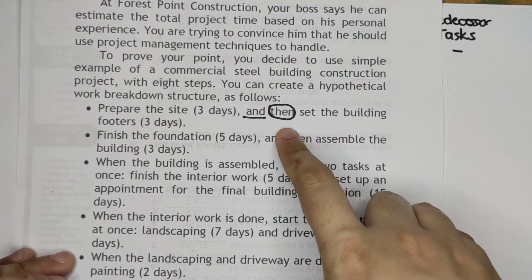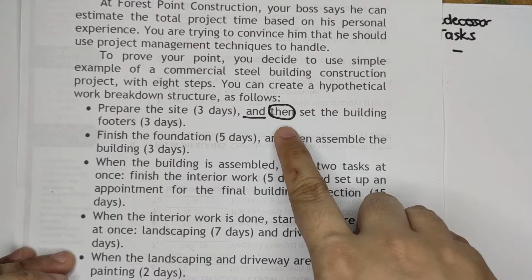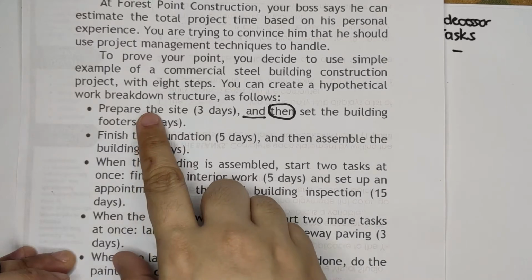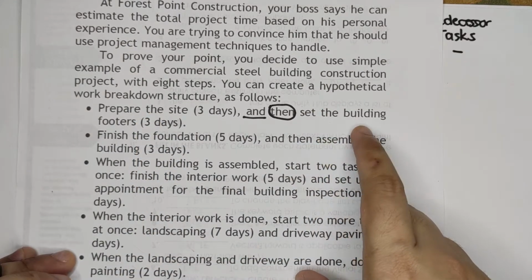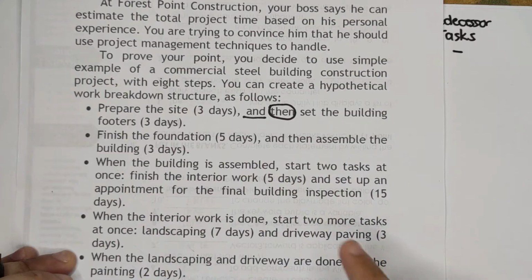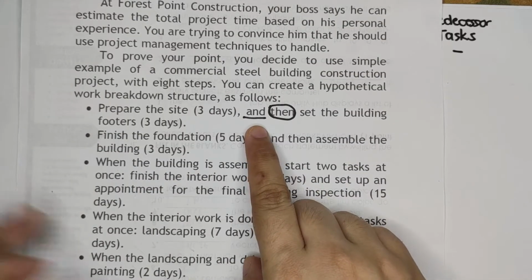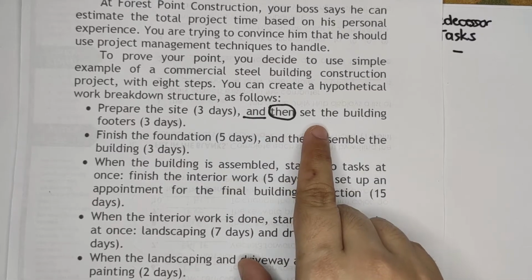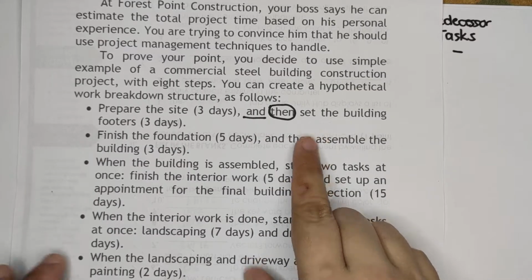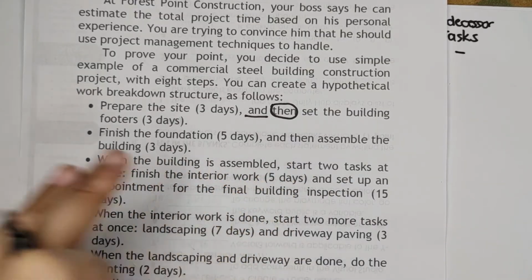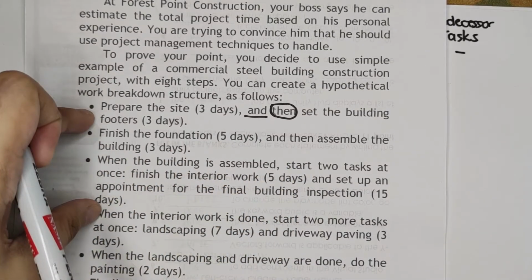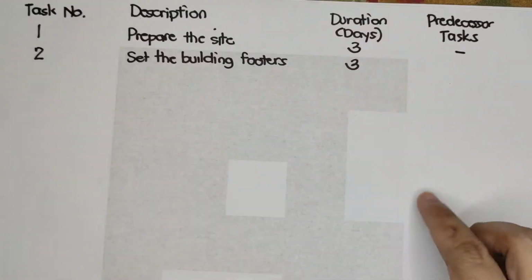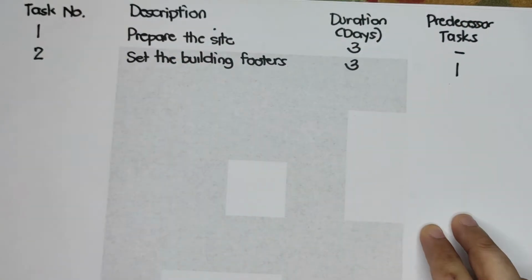If there is the keyword then, it means that after preparing the site is finished, the building footers will be the next task. So we can infer that set the building footers is task number 2, and its predecessor task is prepare the site, which is task number 1.